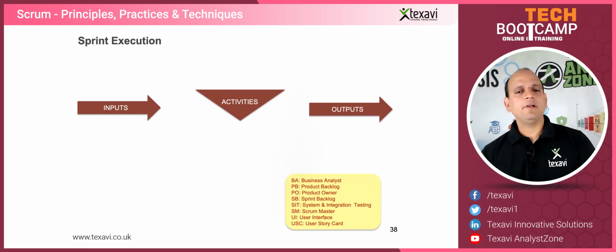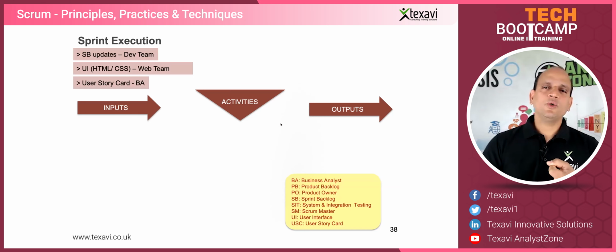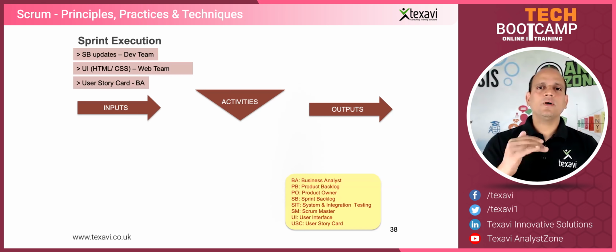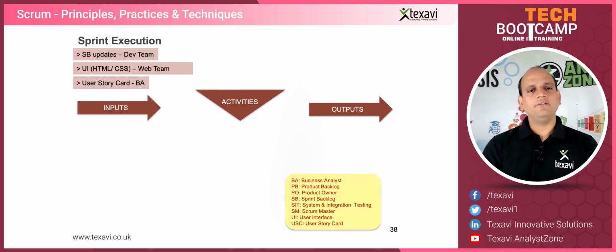In the example of our mobile site, those are, for example, the items list page, the item details page, and showing one single photo of the item, title, description. This is what we have agreed upon to complete in the first 2 weeks. So by the end of November first week, we should have these ready to be delivered.